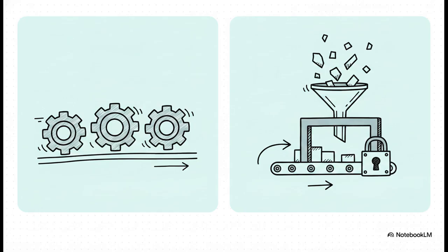Scrum assumes you can make nice, predictable 2-week commitments, which completely falls apart when urgent support tickets suddenly flood in. Kanban, on the other hand, pulls unpredictable work as it arrives, uses explicit compliance gates, and honestly, it just fits interrupt-driven maintenance teams so much better than Scrum.